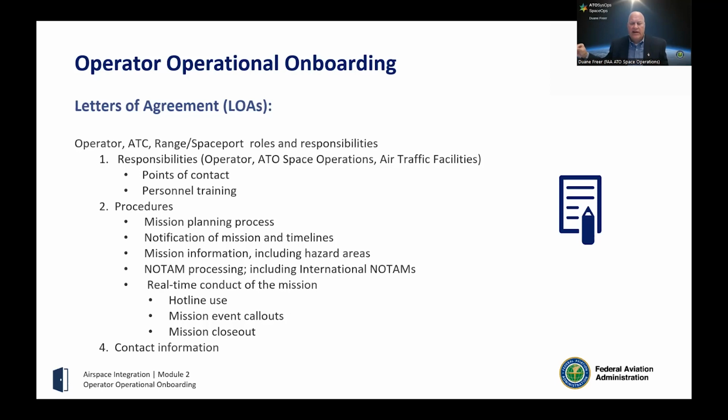We have points of contact, personnel training, and then we have procedures within there. The mission planning process typically includes things like time requirements, how far in advance an intent to launch needs to be submitted, and then the notification process of mission and timelines, mission information. A key component of that letter of agreement is NOTAM processing, and that includes international NOTAM processing.